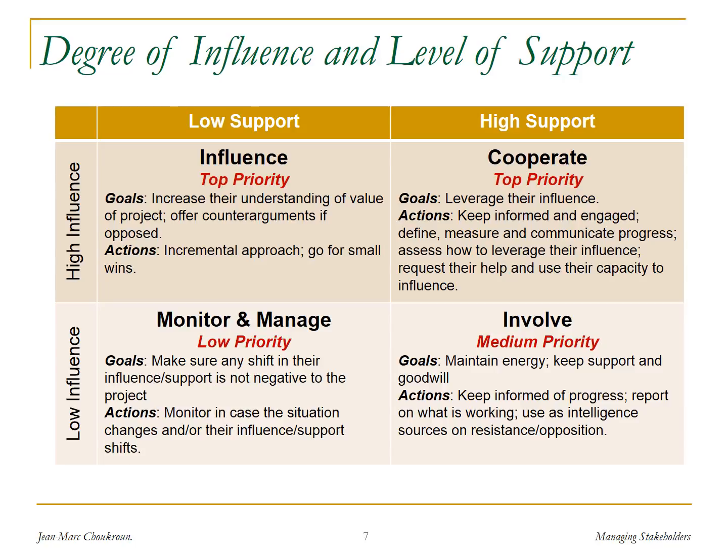You want to involve them in the project to maintain their support, because since they don't have a lot of influence, it could be that they will sort of fade away. They will say, well, we can't do anything about this project, so let's think about something else. So you want to maintain their interest in the project, their goodwill, their energy, by keeping them informed, reporting on what is working, but also, and that's an important part, you can use them as intelligent sources on resistance and opposition to the project.